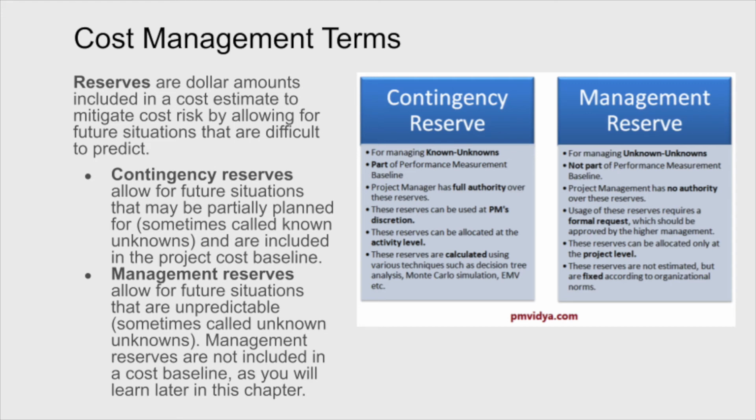And whenever we run into a situation where we need to draw down extra money or we've gone over budget, a management reserve is in place strictly to say, we need to get authorization. We need to go to the board. We need to go through a lot of steps in order to be able to spend this extra money. And it is not easy to pry money out of a management reserve, nor should it be, because what it does is more or less just an emergency situation pops up. We need to fulfill that emergency.